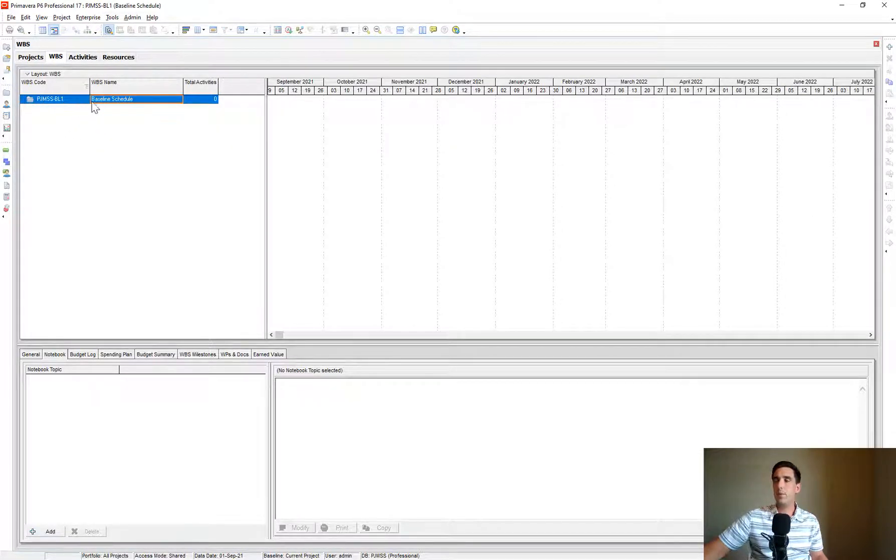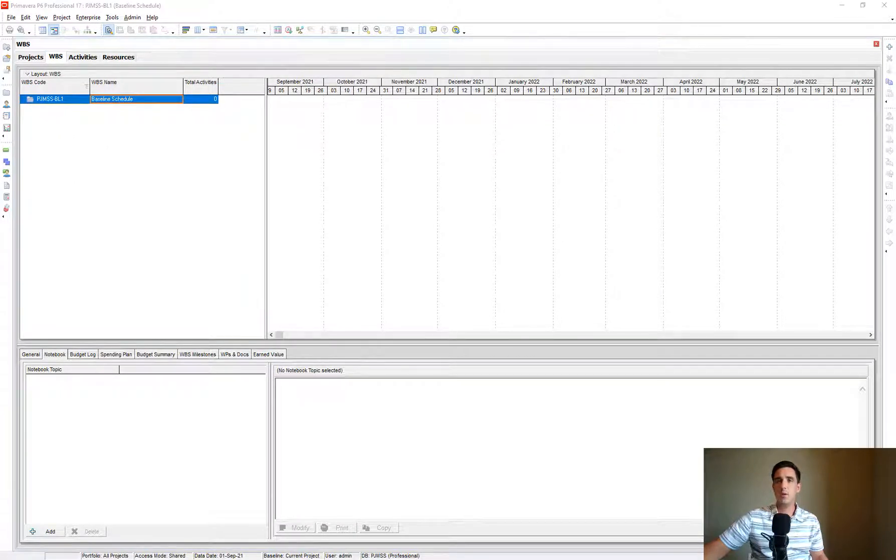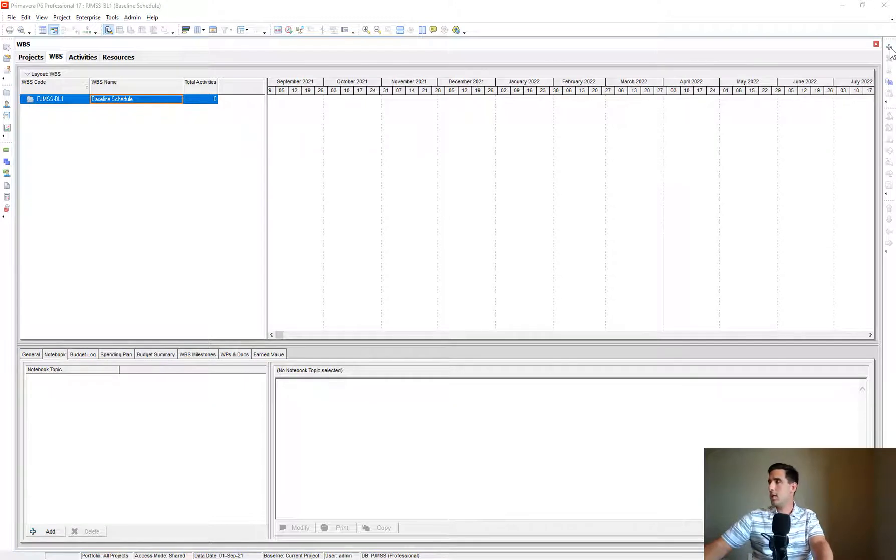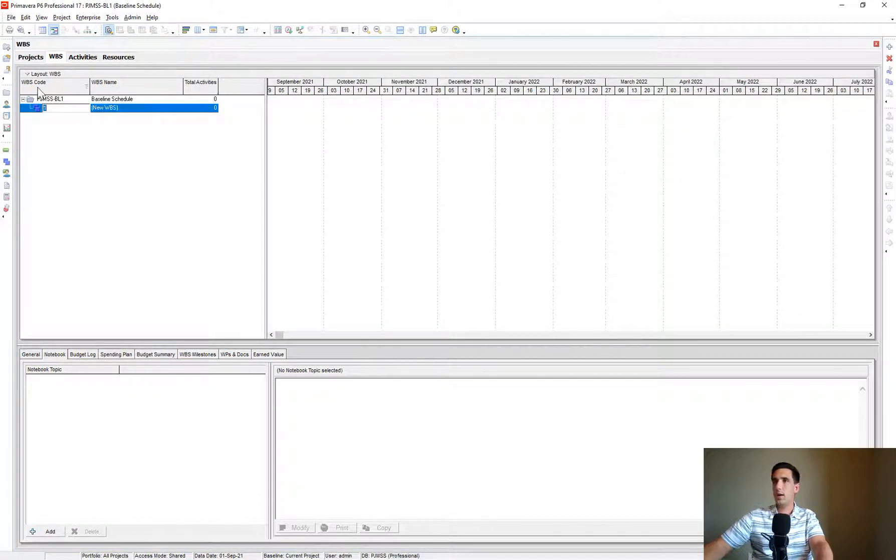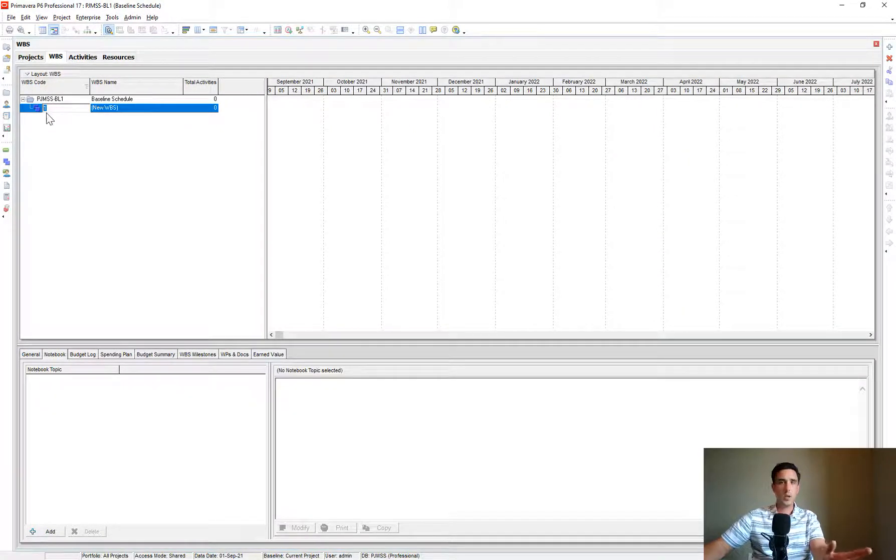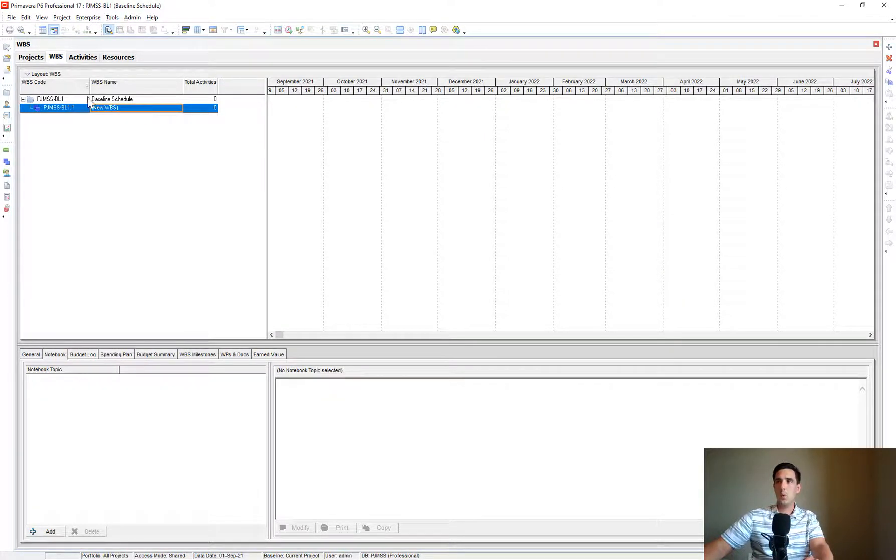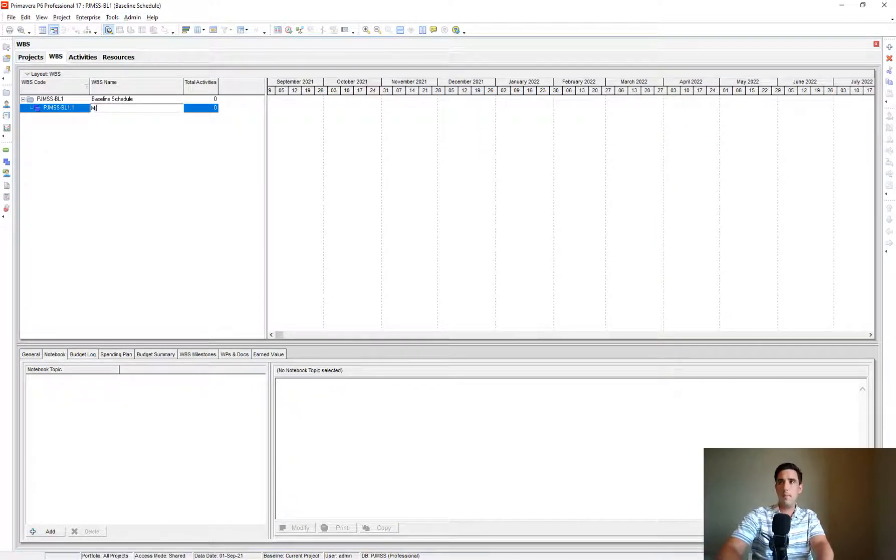Now we have our project and there's no WBS sections underneath. Following our organization from our example project, I'm going to click Add and it creates a WBS code automatically of one. Don't change the WBS code. Just leave it. There's no reason to change it. What we're focused on is the WBS name. So we're going to do Milestones.